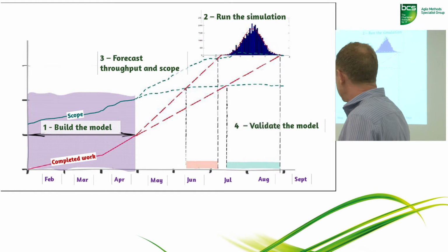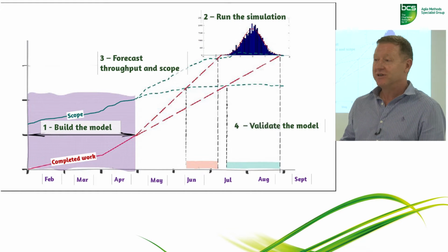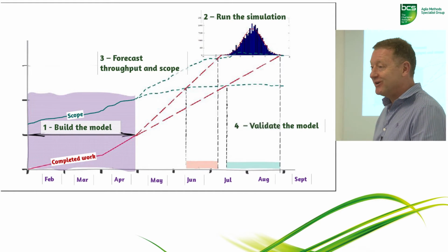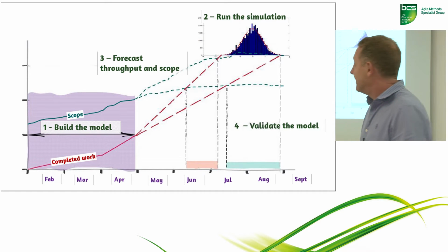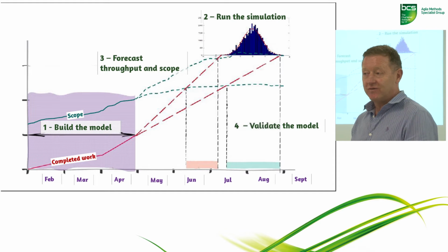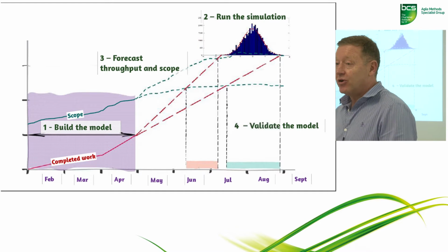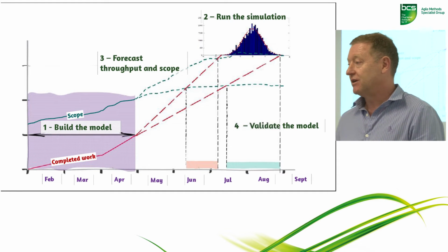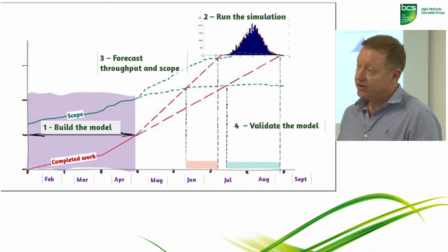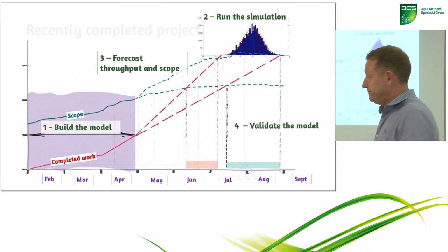Except that, if we were to tell you that, it would be quite a leap of faith for you to say, oh, well, I totally believe in Monte Carlo, this whole idea of Monte Carlo and simulation of projects. But one of the best aspects of this approach is that you can validate your model. You can actually go back and look at a project that finished last week, last month. And you can replay the model for that project based on, you know, 9 months ago or something like that. So that's what we did.